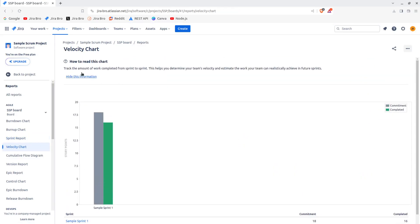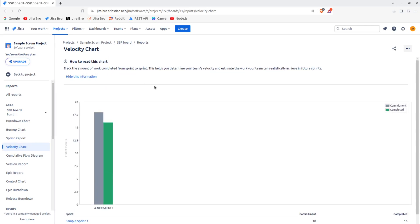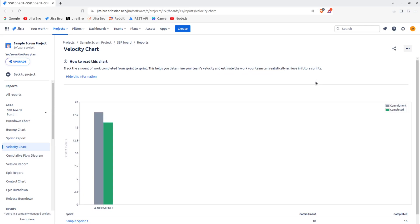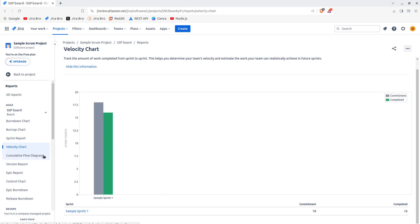And also to track the amount of work completed from sprint to sprint. What this is, is this helps you with team's velocity and estimate the work that your team can realistically achieve in future sprints. As you can see right here, this is the commitment. And this was how much was being completed, which is a pretty good thing because you have 16 completed. And this is for the story points, and the commitment was for 18 story points.